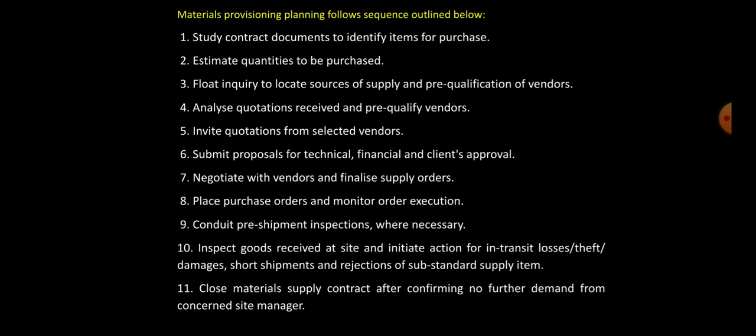The first step is to study the contract, and studying contract documents will help us to identify the items which are required to be purchased. This is followed by estimation of quantities to be purchased, and floating inquiry indents to locate sources of supply. Pre-qualification of vendors is the next step which has to be followed. Analyzing quotations received